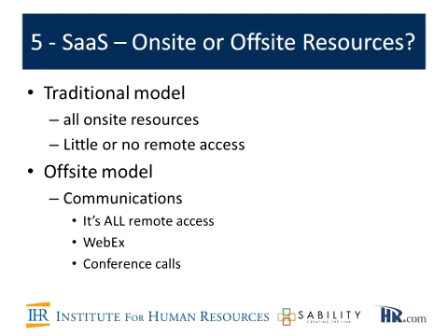While you've gone through system testing and configuration, we've seen a lot of issues, so it's nice to have someone on site. And then finally, some clients like consultants there during the go live, especially if it's a high profile rollout for any reason, or if testing didn't go that well. You want someone to be able to immediately respond to anything you have. So when you do want people on site, those are the times where we tend to see that it makes the most sense.